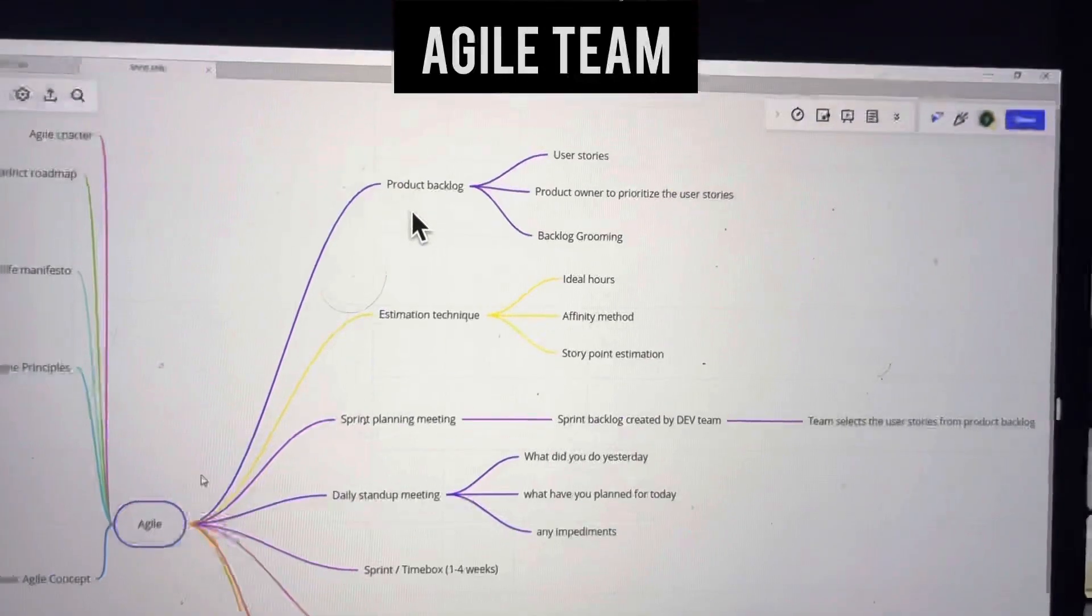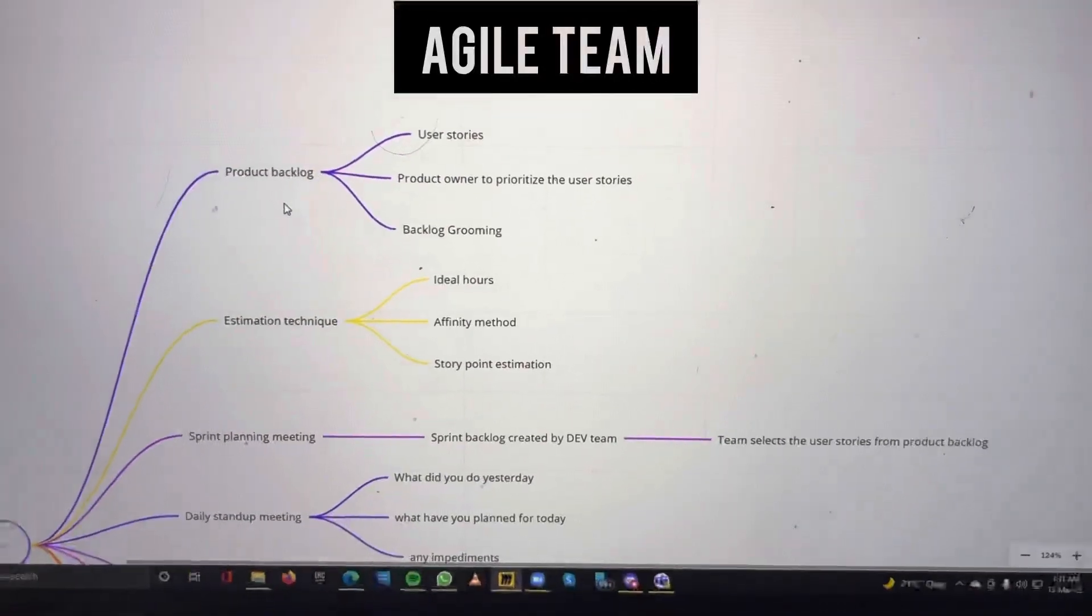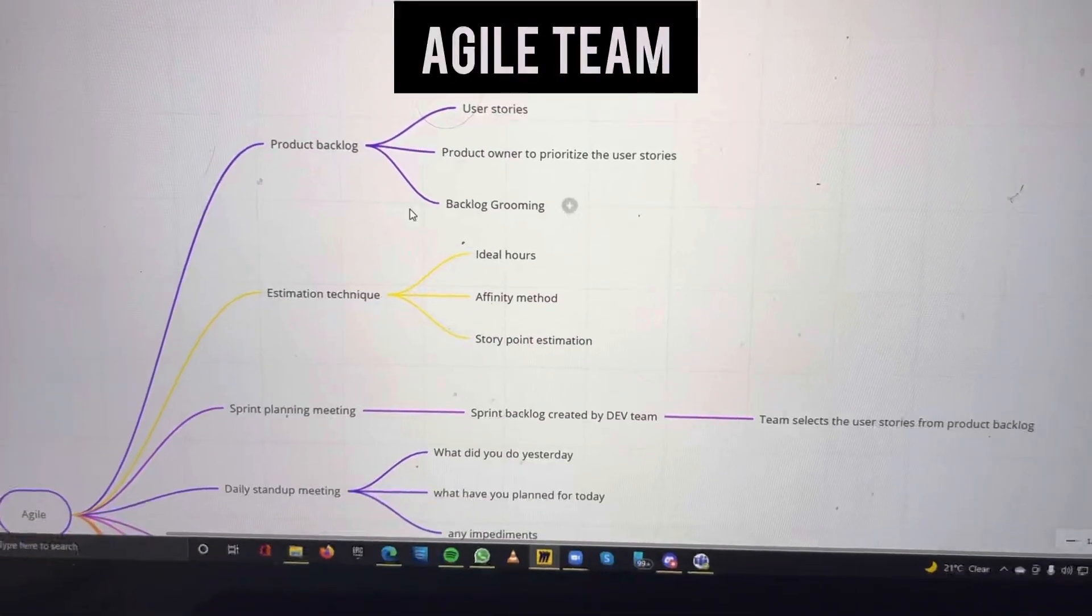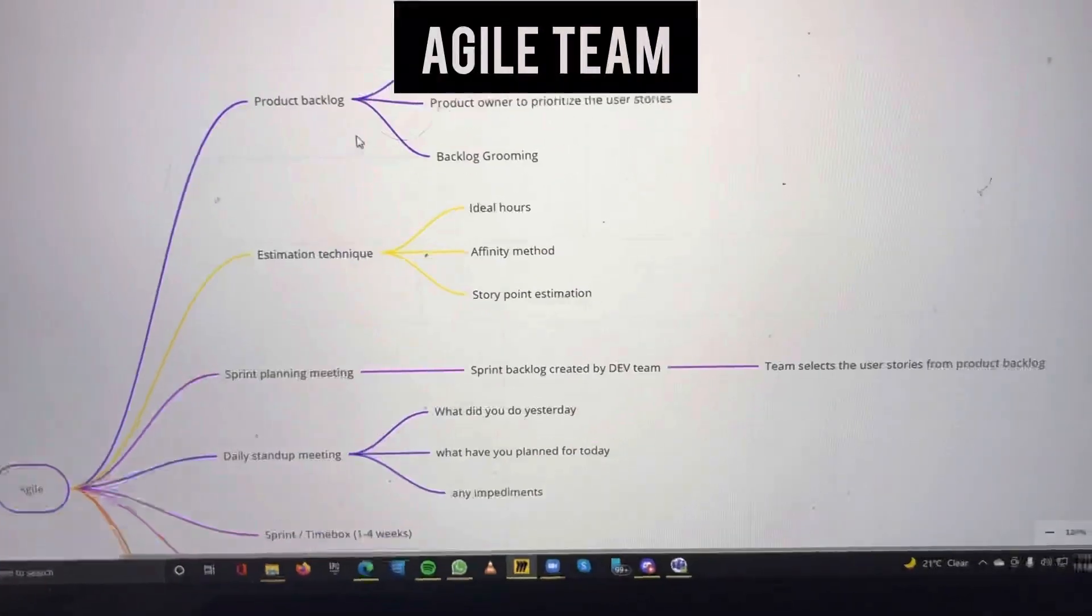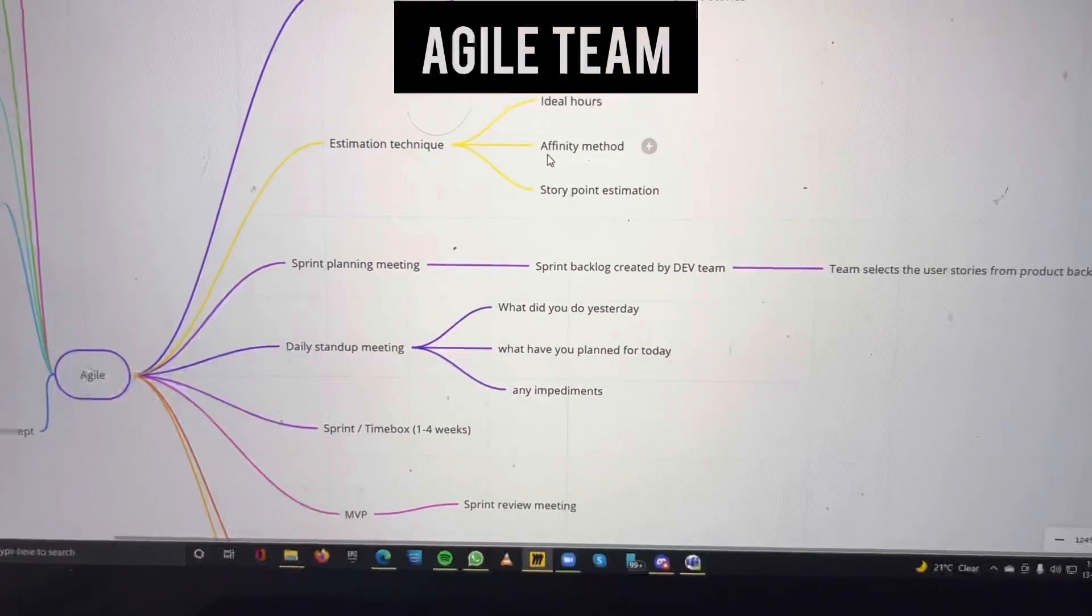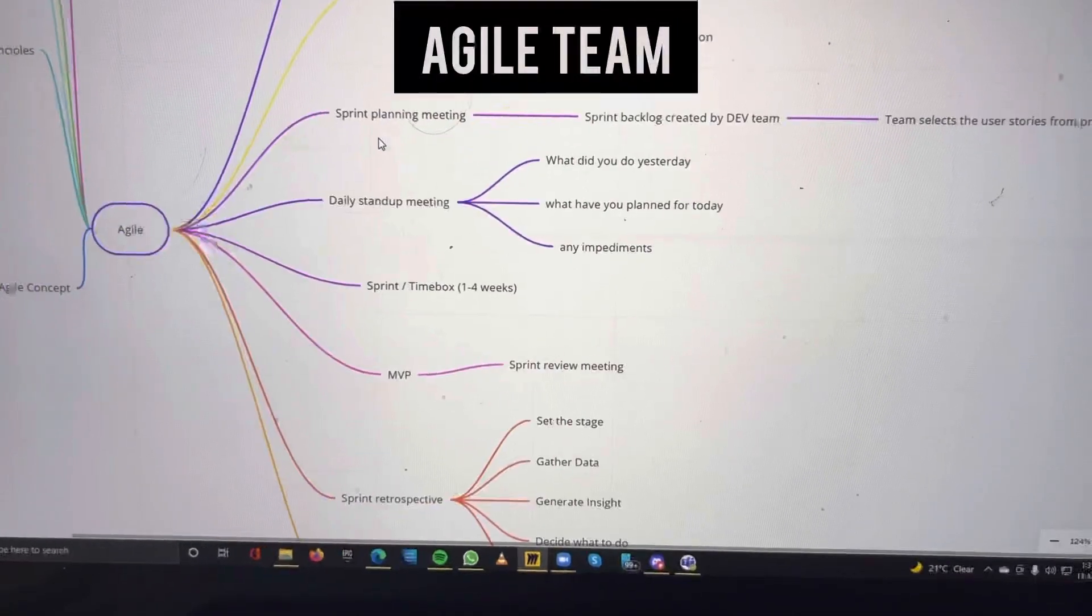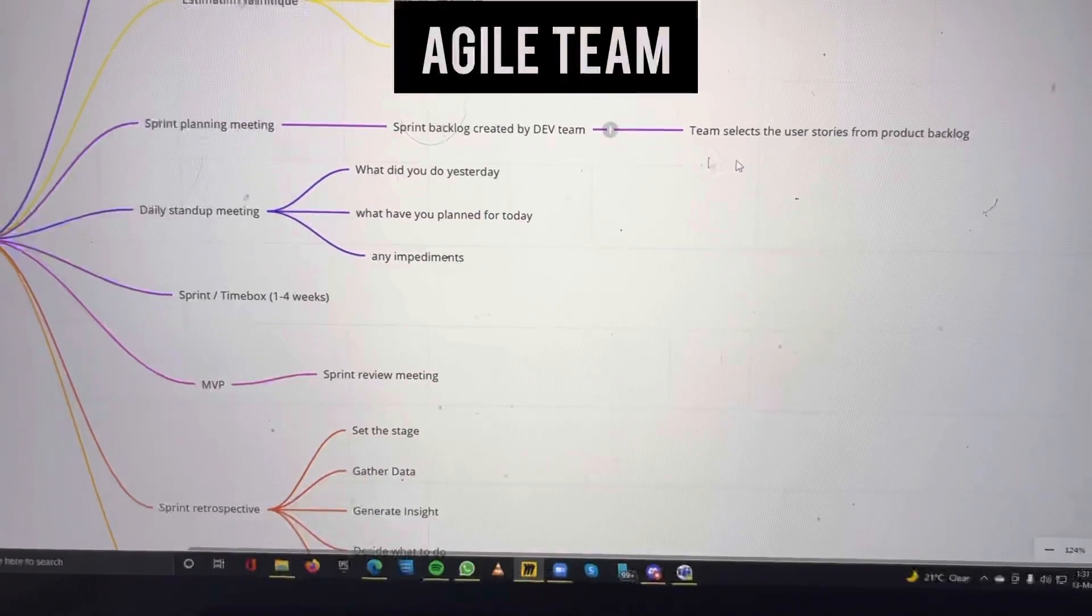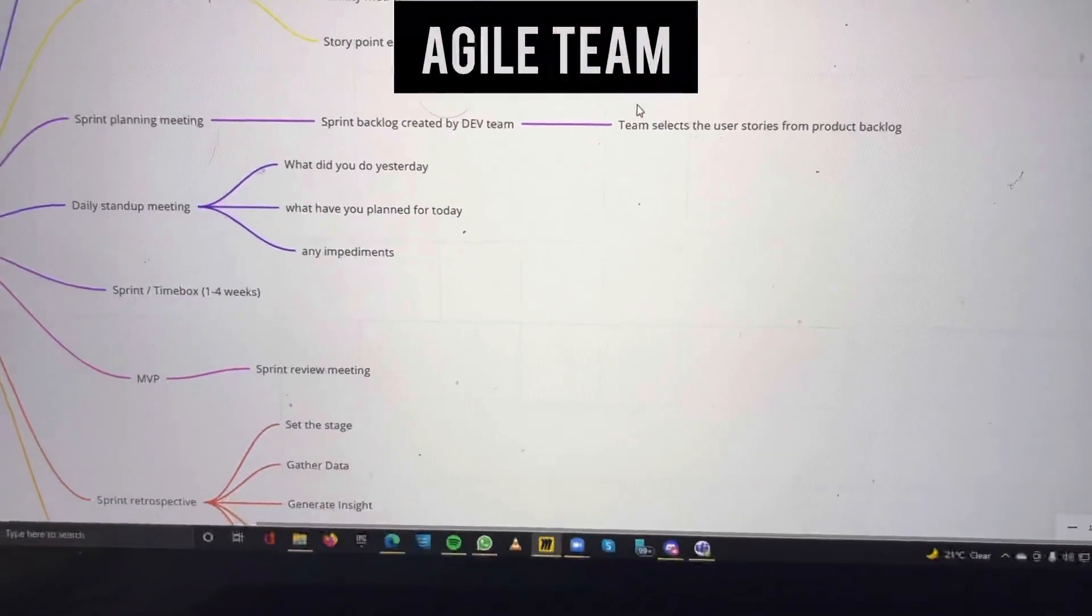The product backlog has user stories prioritized by the product owner. We continuously groom the product backlog. Three estimation techniques are ideal hours, affinity measure, and story point estimation. In the sprint planning meeting, the development team decides which user stories to select from the product backlog.